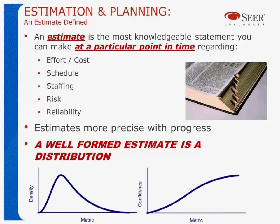What's an estimate? I always look at an estimate as the most knowledgeable statement you can make at a particular point in time regarding the effort, the cost, the schedule, the staffing, the risk, and reliability. By that definition, a well-formed estimate is a probability distribution. That means if I say it's 12 months and $3 million, I need to establish a probability — 50%, 60%, or 70% — that it's that many months and that many dollars. Without that, estimates can go far, far awry. Not knowing the probability of your estimates is important.